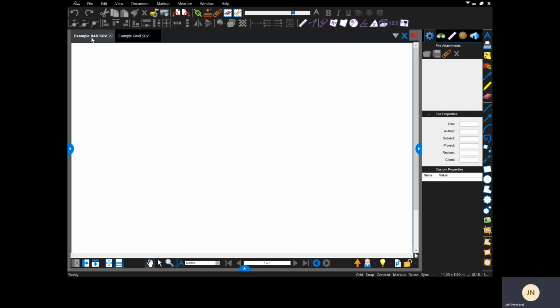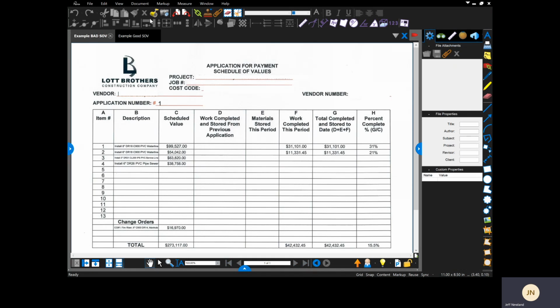So what I'm going to show you first is an example of a schedule of values that is not exactly to the level that we need. Here's a utility contractor, simply 4 bulk line items, and no labor shown, only material. You can't tell footages or anything, so it's very tough. This pay app would get rejected, absolutely, because you can't quantify the dollar amounts.